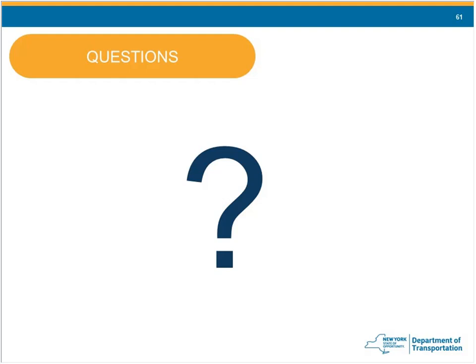Your $0 change orders are adding items to the contract at $0 value, and they only go to the regional approval level. So remember, this class was established for traditional design bid build. If you're on a design build contract, please discuss the nuances with your regional change order specialist before you go too far into your change order process.